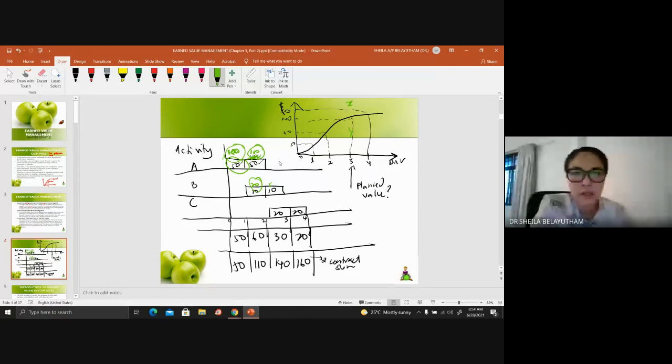Okay, so when you are trying to address the schedule factor or progress factor, normally how we calculate is based on what we observe on the site, and we have to find the percentage. So for example, you have activity A budgeted at 50 ringgit. If I have completed 50% of the job, which means I have completed basically 50%. So for example, activity A is 50 and 50. In order to get 100% of the project progress, you need to complete 50% here and 50% here.